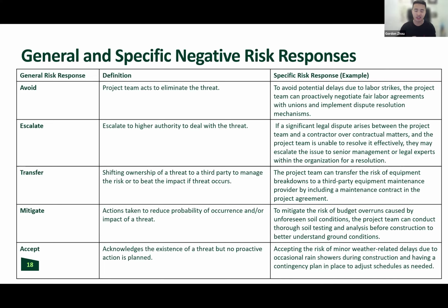The specific actions I'm going to take to mitigate would be to make sure that there's a safety program in place so that everyone knows what safety looks like when you go up on a roof. I'm going to make sure that they tie off. Make sure that they tie themselves to a roof anchor so that if they fall, at least they're tied back, right? They may get yanked, but at least they won't fall all the way to the ground, right? So mitigate and then specific actions for mitigations.